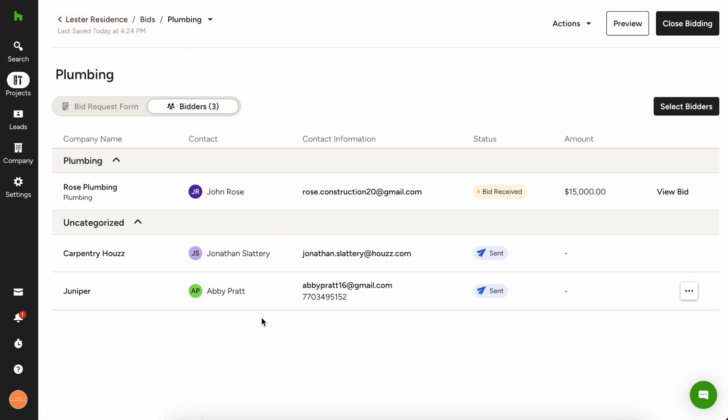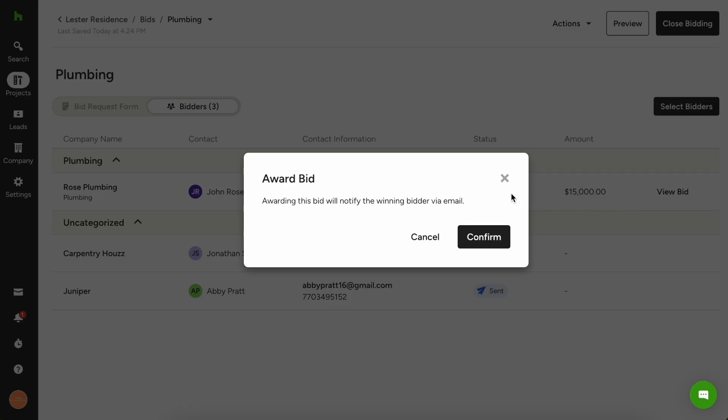You can see that my other two subcontractors that I sent it to have not submitted a bid, but that's okay. We'll give them some more time. And then when you're ready, you can actually go in and award specific bids. So let's say that this is the one that you want to go with. You're just going to click the three dots here at the end and choose award bid.